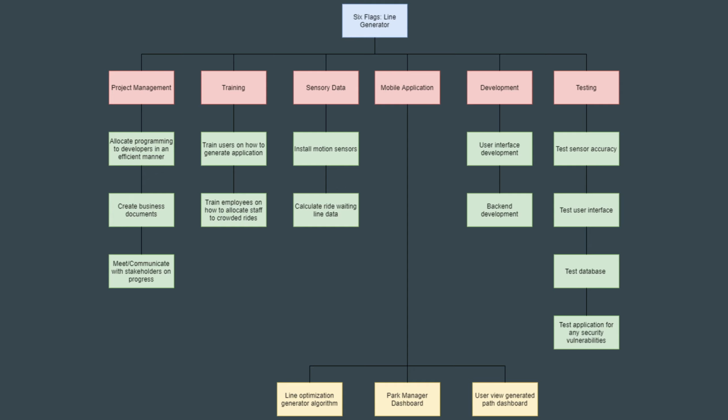Next we have the management control accounts. This is to integrate our scope, budget, and schedule. Everything in the green are planning packages, so these are things that need further planning before we actually do them. And then at the bottom, in yellow, are the work packages. These are big deliverables that we plan to deliver.